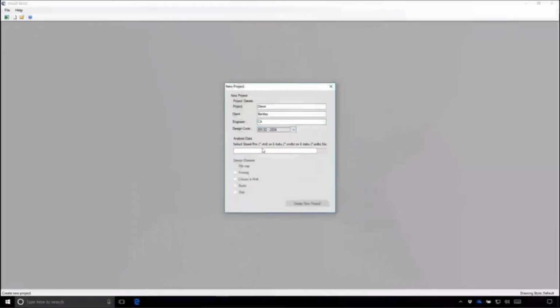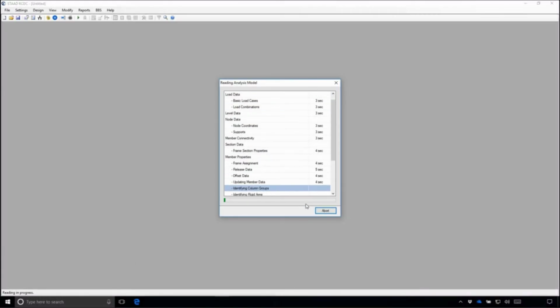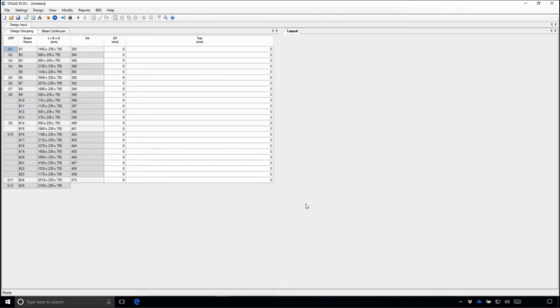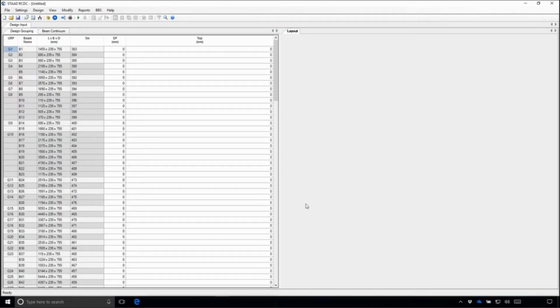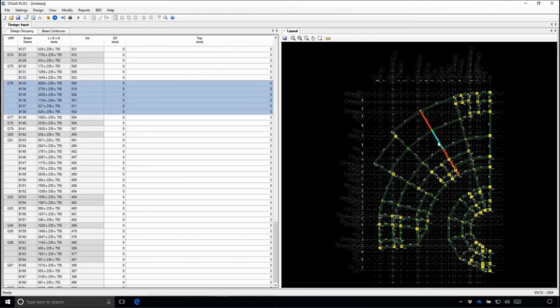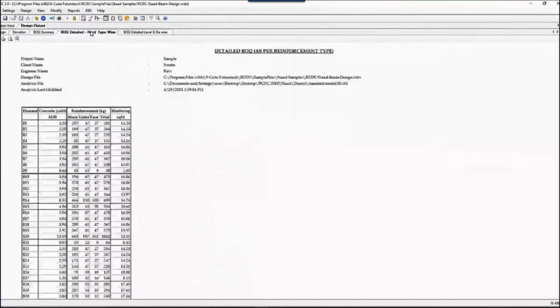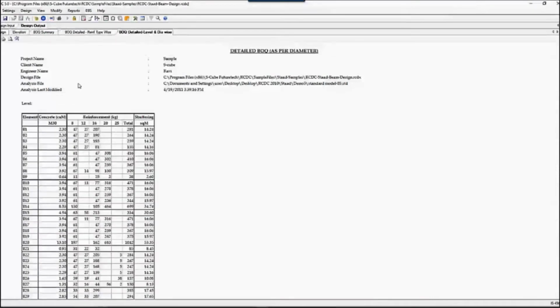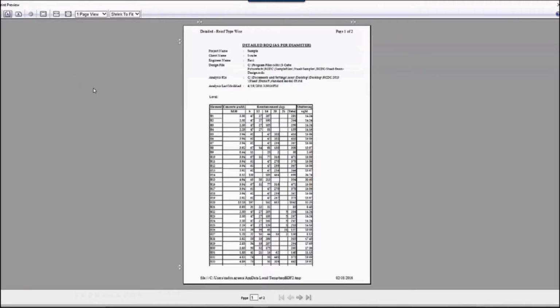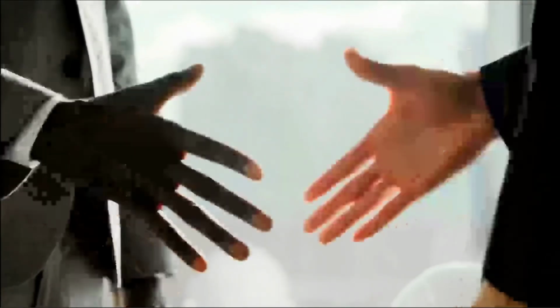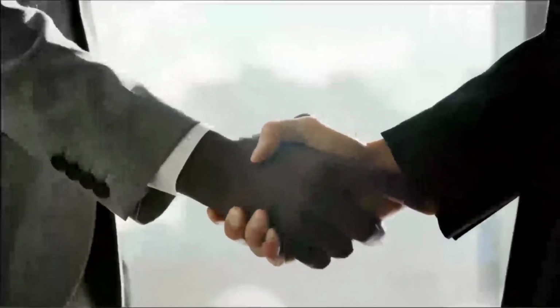Toyo applied advanced engineering design codes using STAAD to comply with the new European standard codes consistent with local design regulations for Malaysia, which set new country standards for concrete design. The ability for Toyo to automate engineering calculations, drawing production, and report generation optimized their design and efficiency. Using STAAD, they were able to complete the conceptual design and detailed engineering within 18 months and obtain early approval by the client.